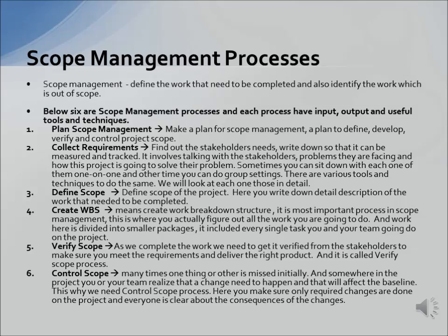The next process is verify scope. As we complete this work, we need to get it verified by the stakeholders to make sure you meet the requirements and deliver the right product. This process is called verify scope. The last process is control scope.